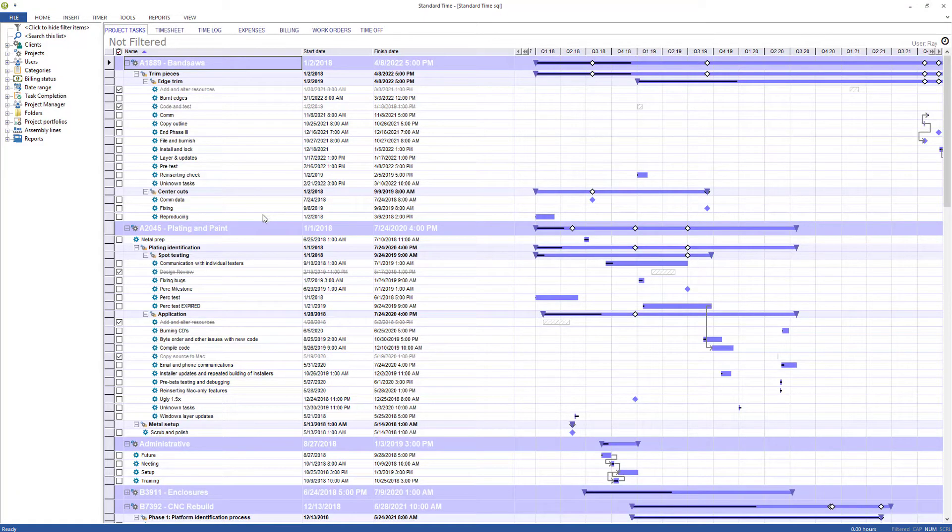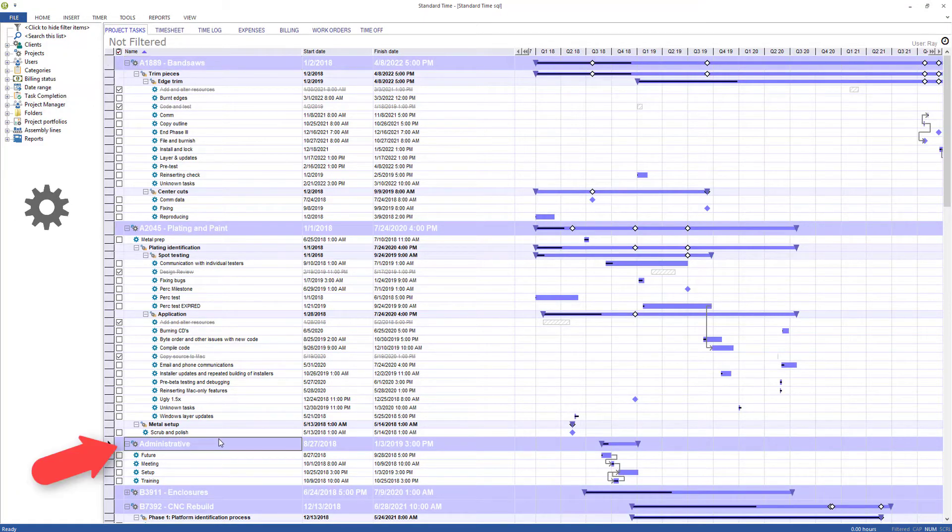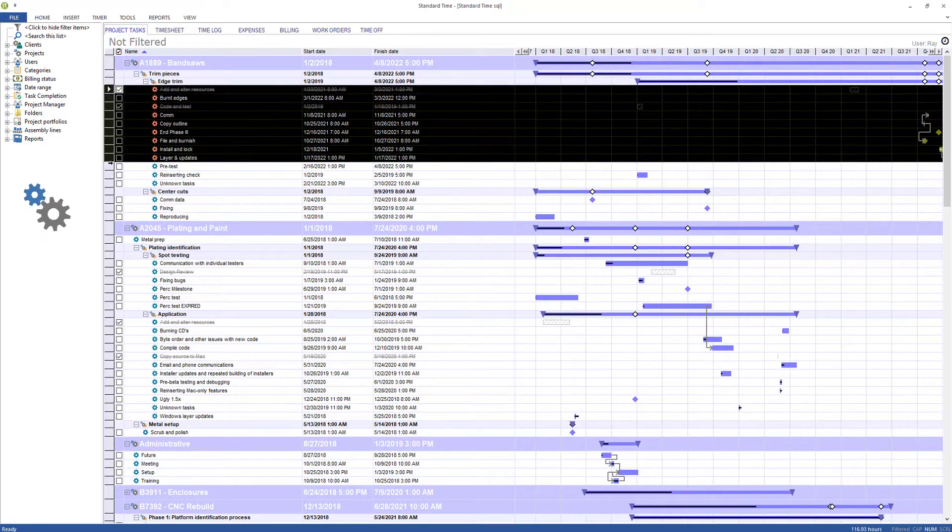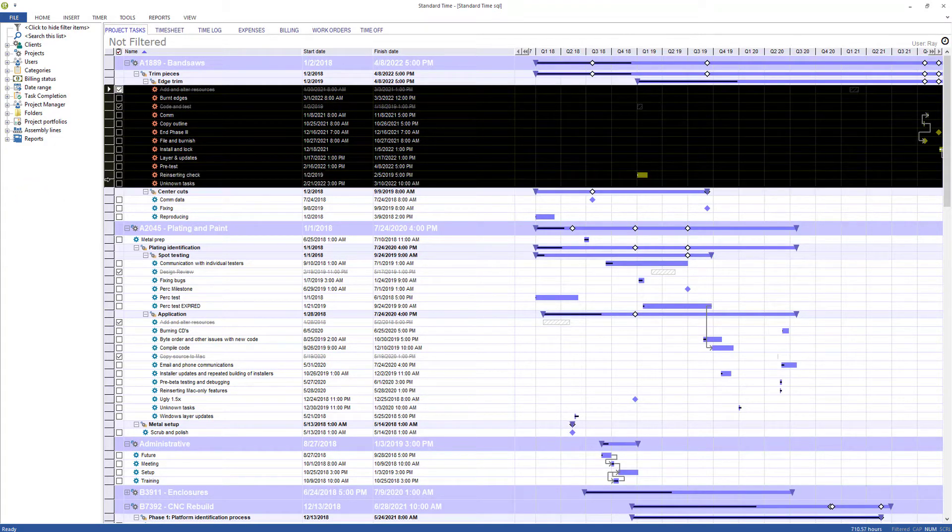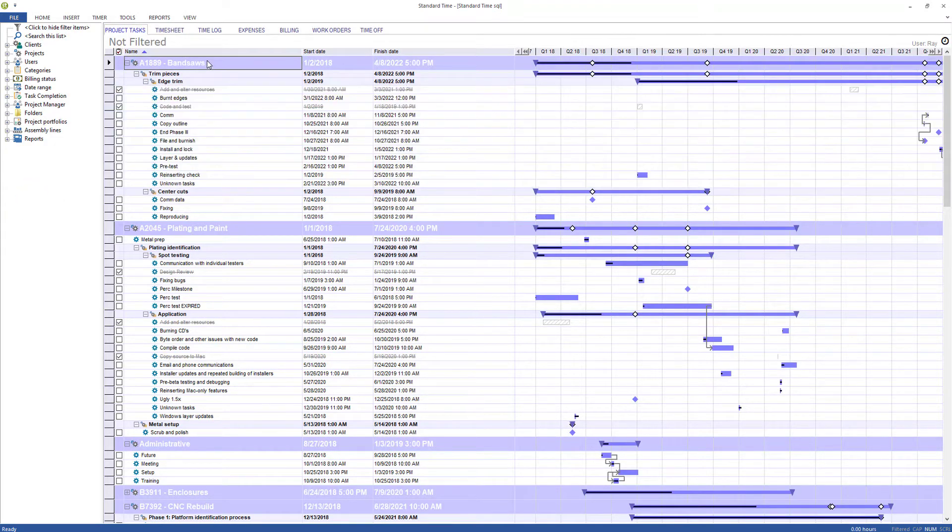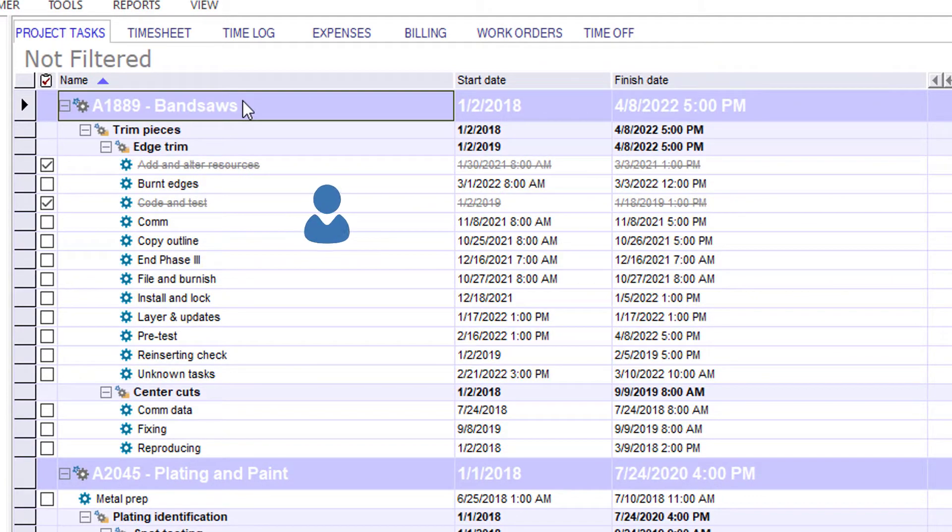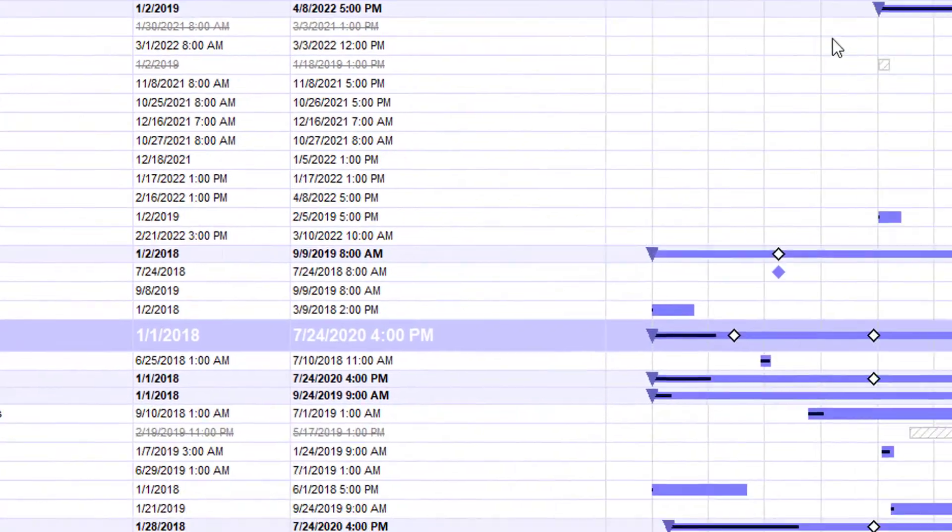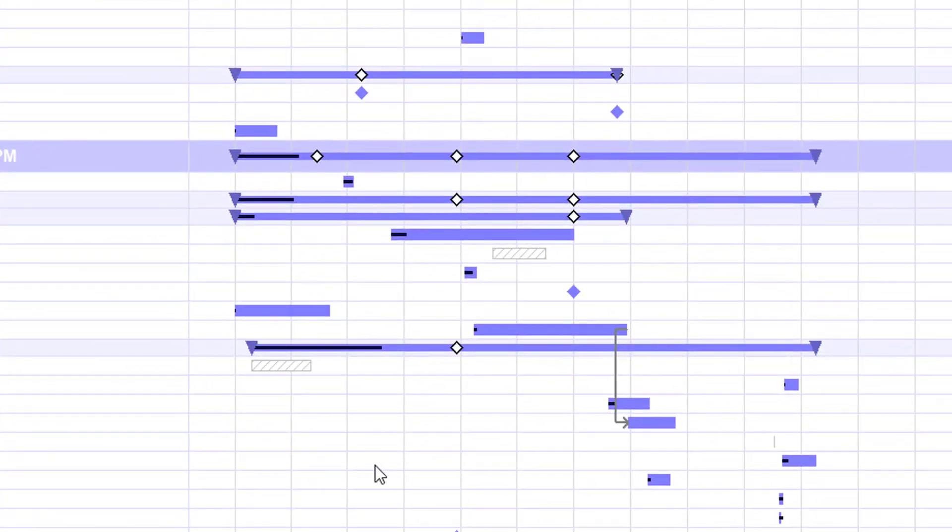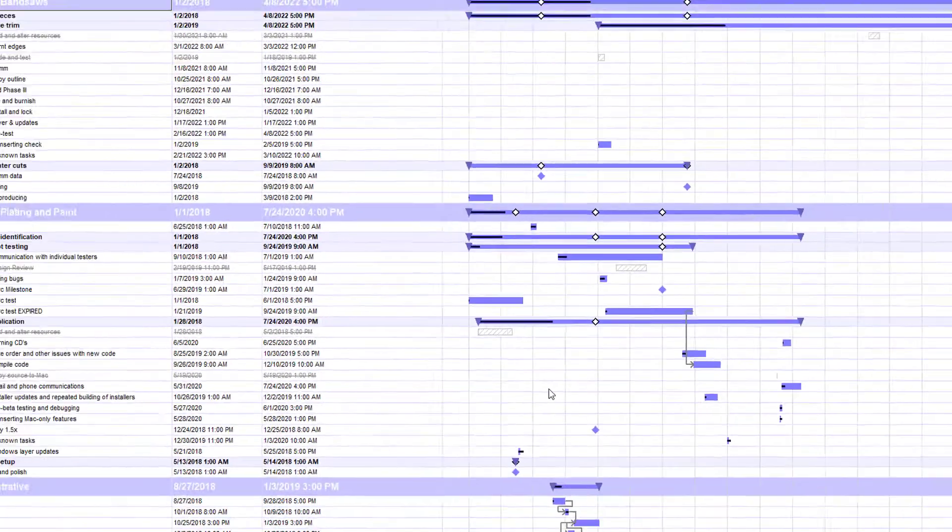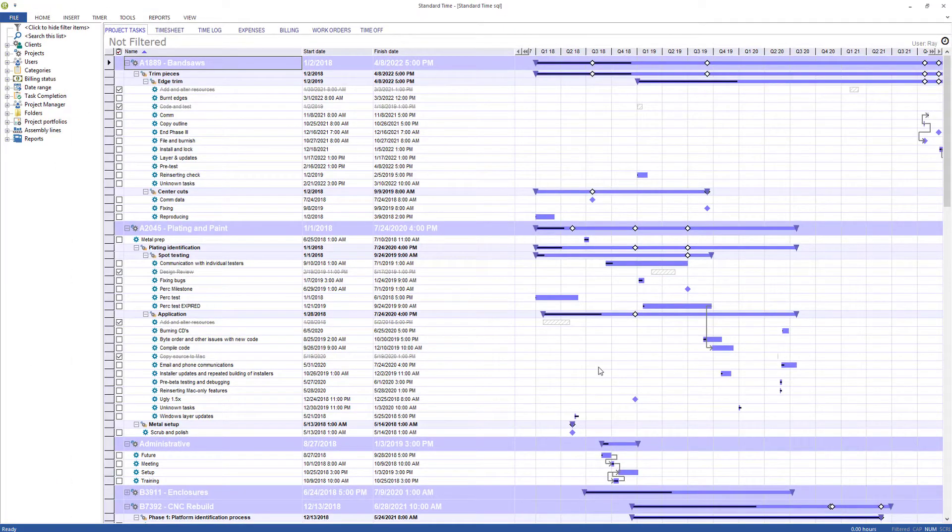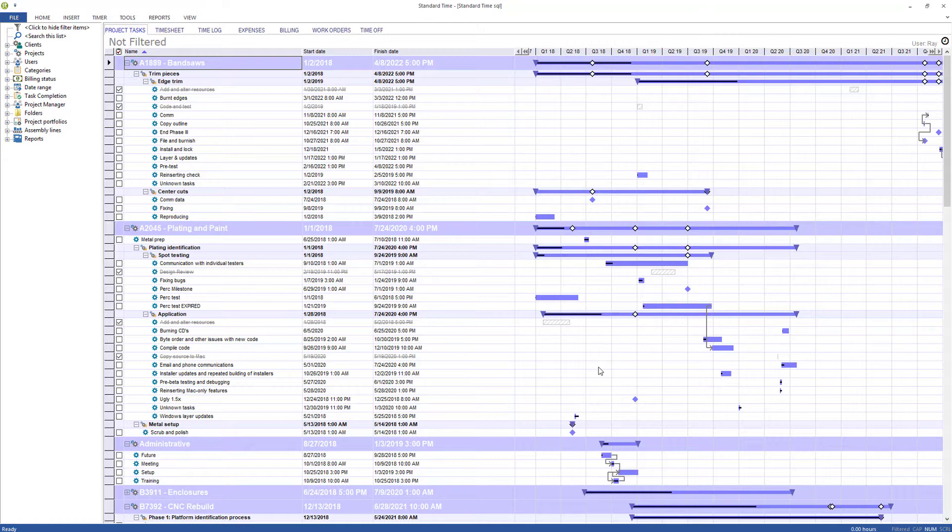I've opened up Standard Time and the wide blue bands that you see here are projects. The actual tasks are under those projects and those tasks are assigned to either people or groups in the organization. Each task has a starting date, finish date, and it can be displayed on a Gantt chart like this. So that is the information source for those charts that we saw earlier.